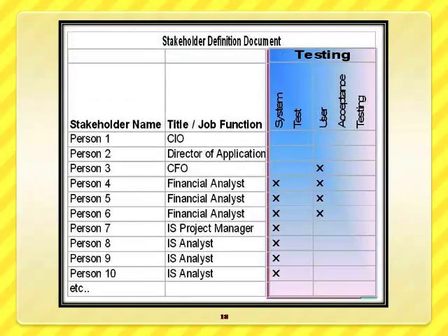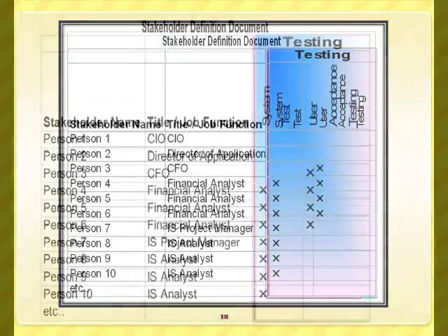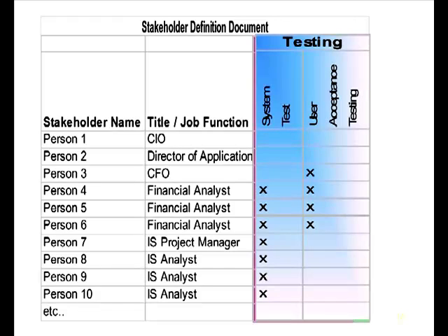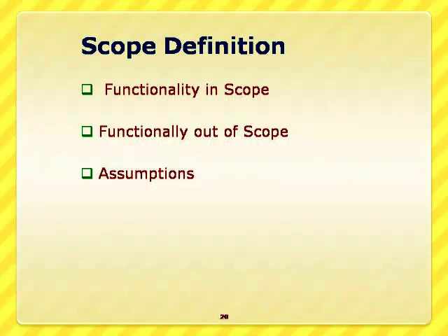Now, after defining the stakeholder definition statement, I have to write down the stakeholder definition document stating what functionality is in scope, what functionality is out of scope, and under what assumptions I am building the data warehouse. This is very important because defining functionality in scope and out of scope facilitates the implementation of the data warehousing project in a time-bound manner, in a smooth way.